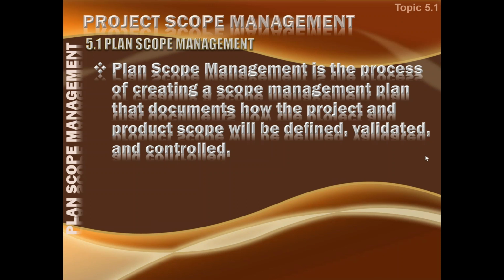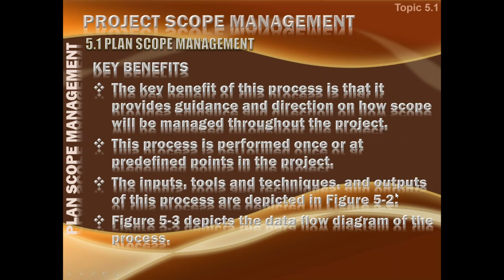And as we defined it earlier, it is a process of creating the scope management plan that documents how the project and product scope will be defined, validated, and controlled. And naturally, in this process, the requirement management plan will also be created. The key benefit of this process is that it provides guidance and direction on how the scope will be managed throughout the project. This process is performed once or at predefined points in the project.